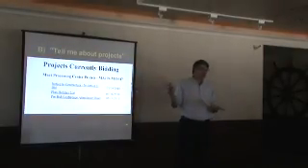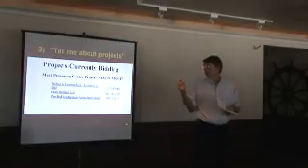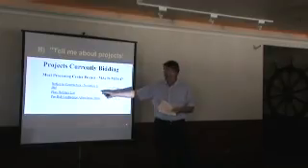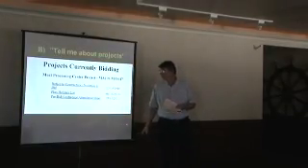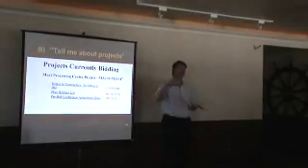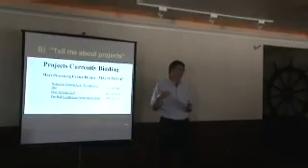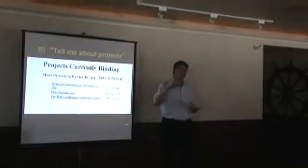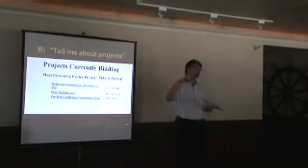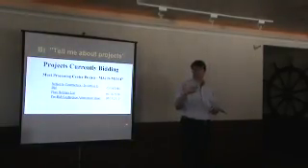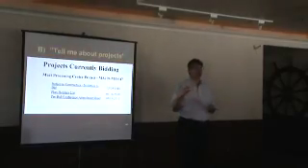That is anybody who requests our CD, and what you have to do to request our CD is fax us the information, your address, etc., which I'll show you in the notice to contractors. On the plan holders list, now you know who the potential primes are that are holding the CD to bid on the project. And then once they get pre-qualified by the CSU, which there's a pre-qualification requirement I'll speak about, you'll see a check mark on there that they're pre-qualified. They could bid on the project if they want to. Once they request the bid documents, then you know that they probably intend to bid on the project.